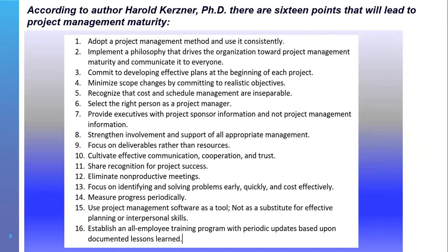So the next point is, and I mentioned this a lot in the first call 2 weeks ago, get the executives involved in the project. Get the decision maker on the customer side involved in the project. Try to get your practice owner, your Acumatica lead, whatever function or however you call the function in your organization, get them involved into the project. Do steering committee meetings. Every month you should organize a steering committee meeting where the two project managers, you and the customer project manager together, updating the senior management.